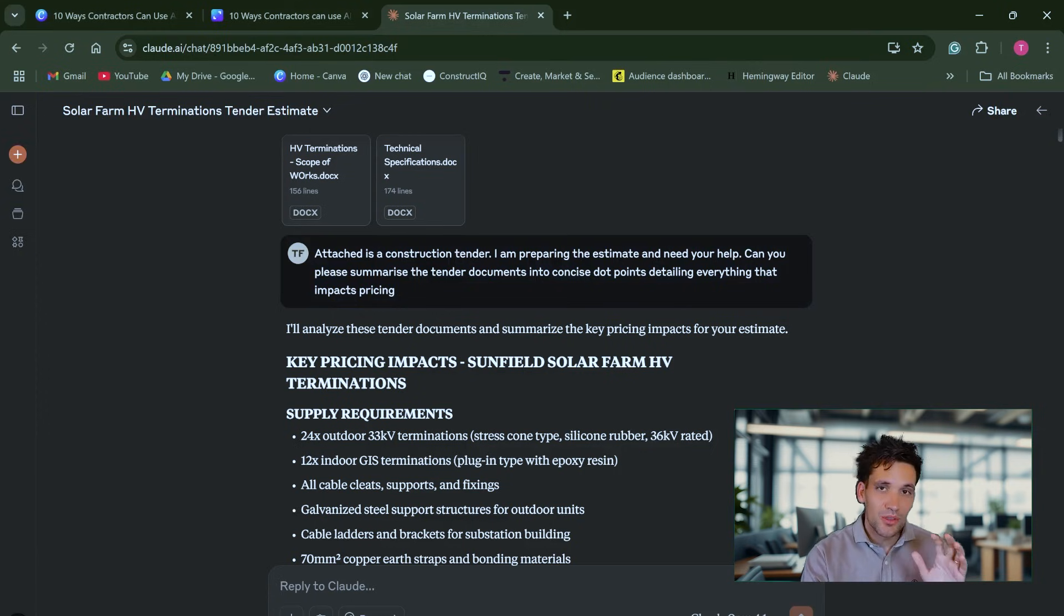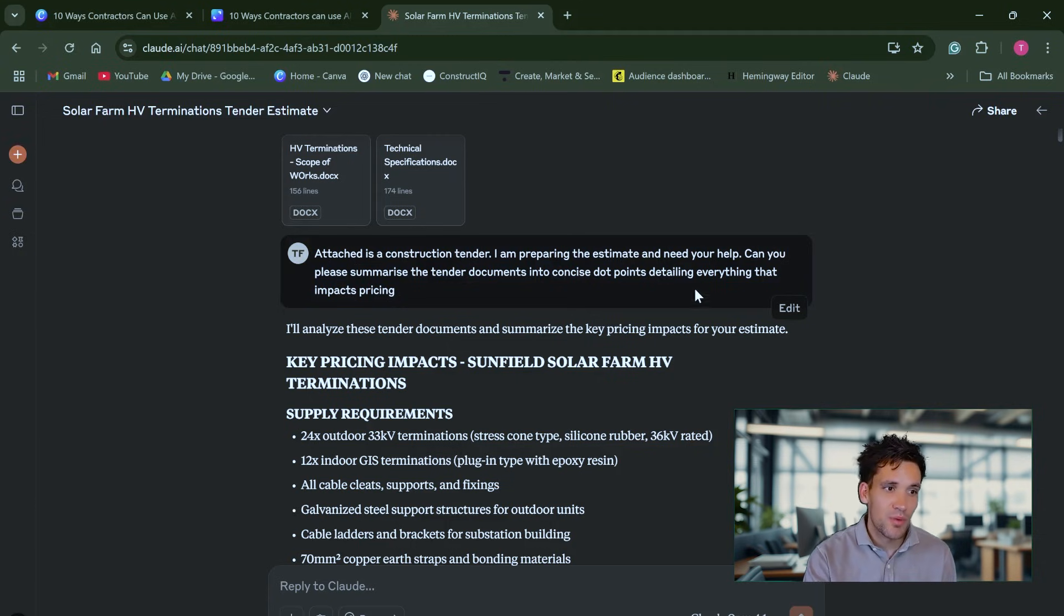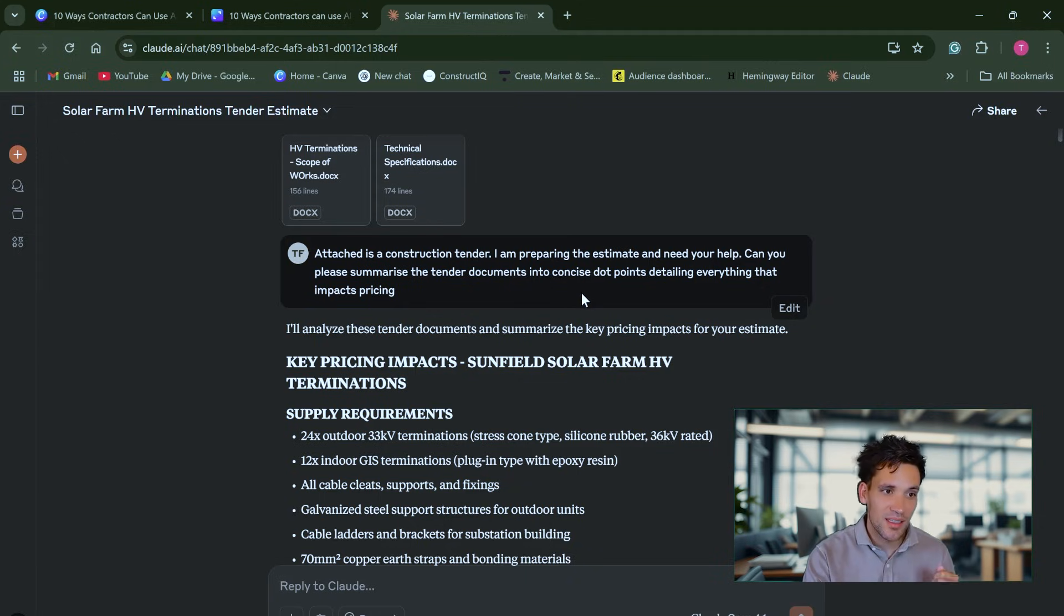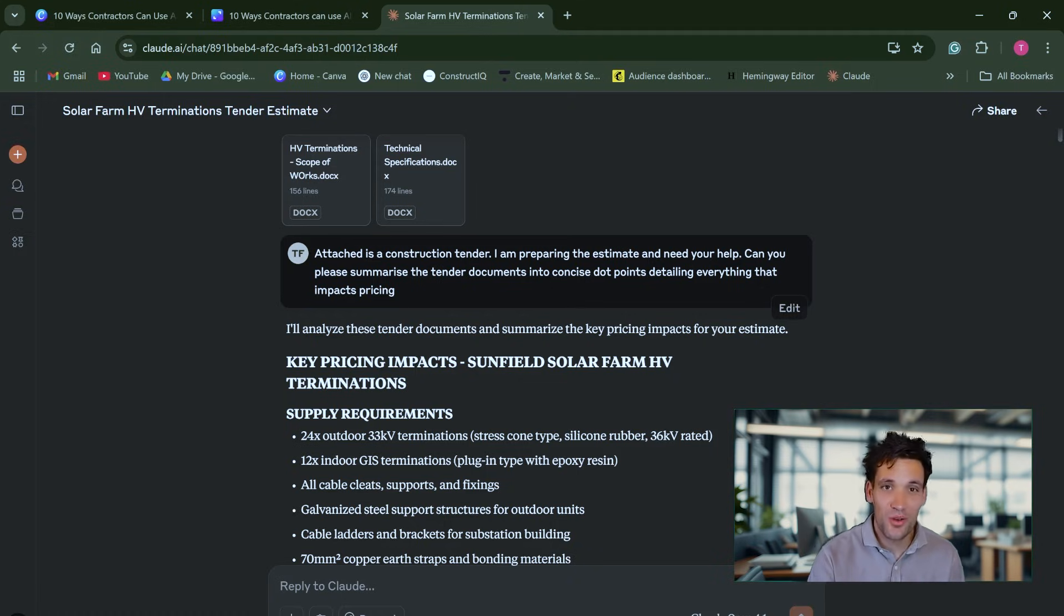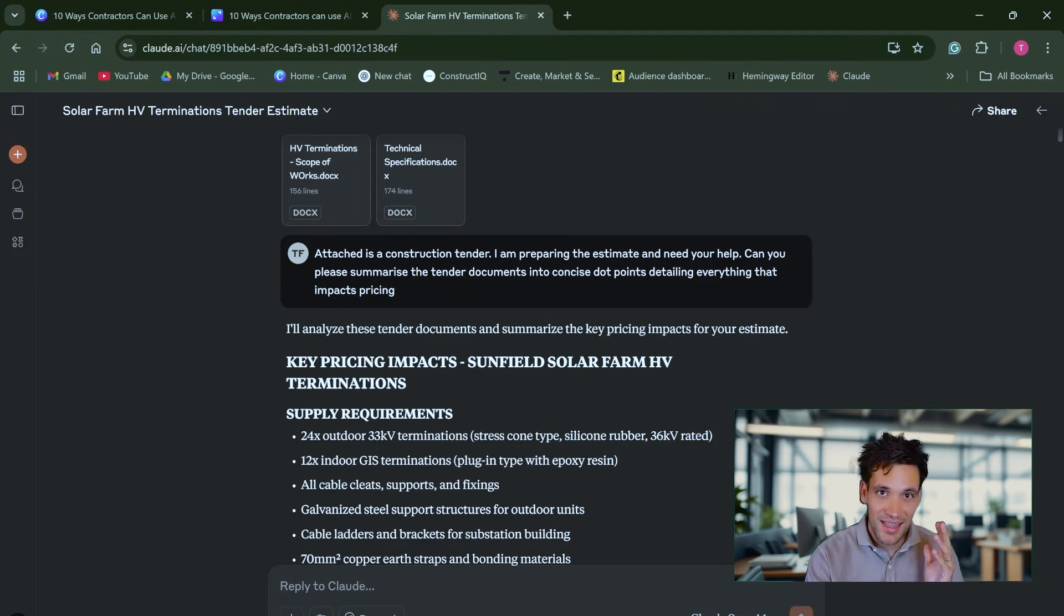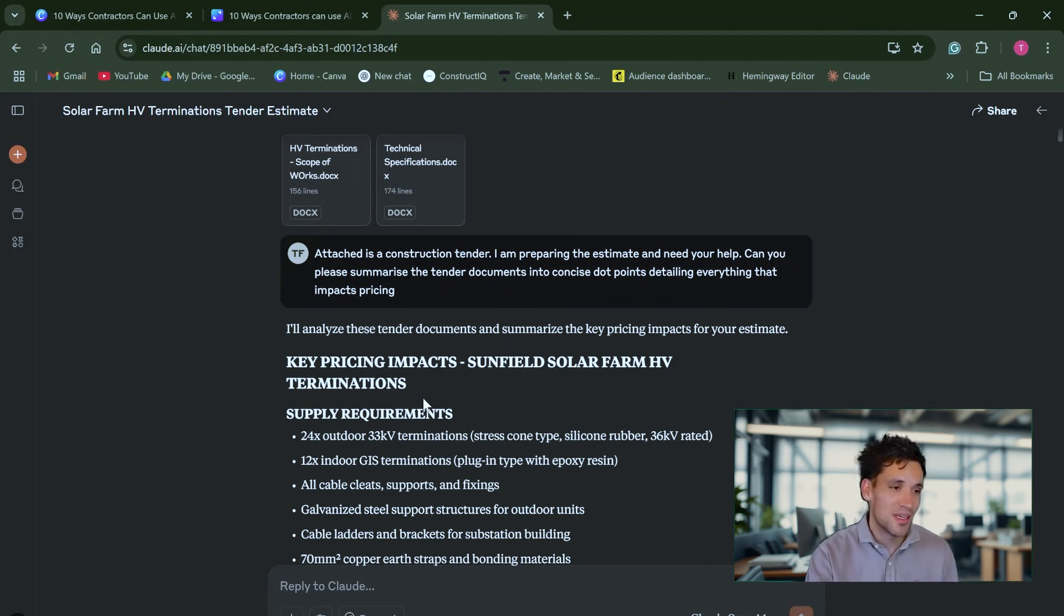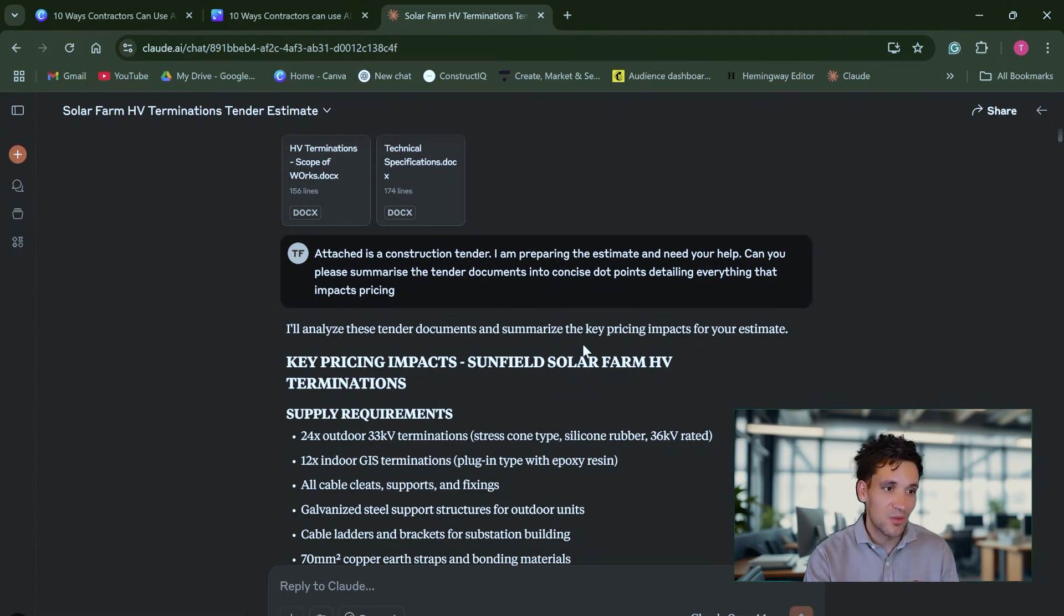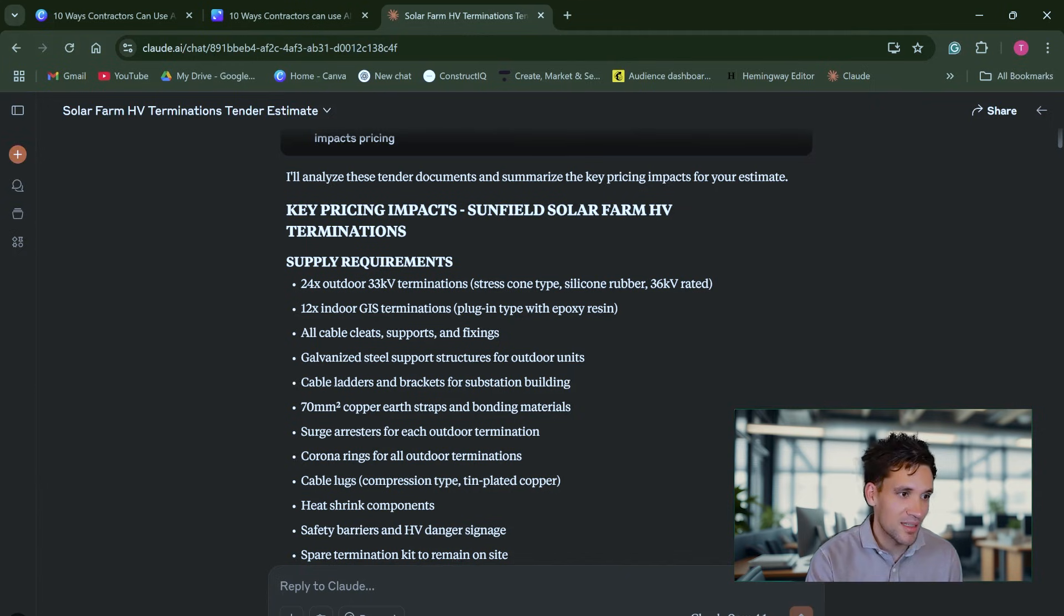As an example, using Claude, the Anthropic large language model, I've prompted it, attached a construction tender, I'm preparing the estimate and need your help. Can you please summarize the tender documents into concise dot points detailing everything that impacts pricing? Now this is a small tender but often, as we know, we sometimes get construction tenders with 30, 40 documents, thousands and thousands of pages. So reviewing them all manually just isn't feasible during tender timeframes. So this is an example where I've just asked it to analyze the tender documents and summarize the key pricing impacts.